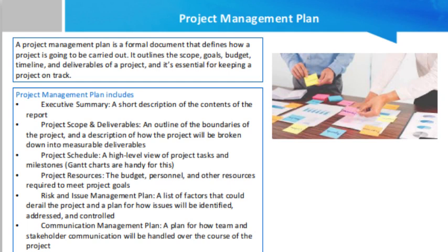Plan ahead. Create project status reports to communicate progress to stakeholders. As we discussed, communication is fundamental in any project. But even so, something that's often overlooked by project managers is a communication management plan, a plan for how the project team is going to communicate with project stakeholders. Too often, project communication defaults to ad hoc emails or last minute meetings. You can avoid this by planning ahead. Start with a project kickoff meeting and include a project status report template as part of your communication plan.